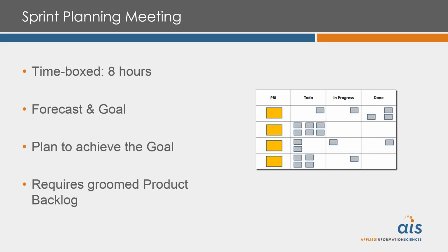What you're looking at on the right is the visualization, or a common visualization, I should say, but not the only way to visualize or surface the plan. So we have 4 product backlog items denoted in yellow, and then we have a whole bunch of things that could be tasks. Many teams will break those down into explicit tasks that they need to come up with. And then they may also use tests instead. So some teams come up with tests that they are going to use and expect to be passing to call that particular product backlog item done.